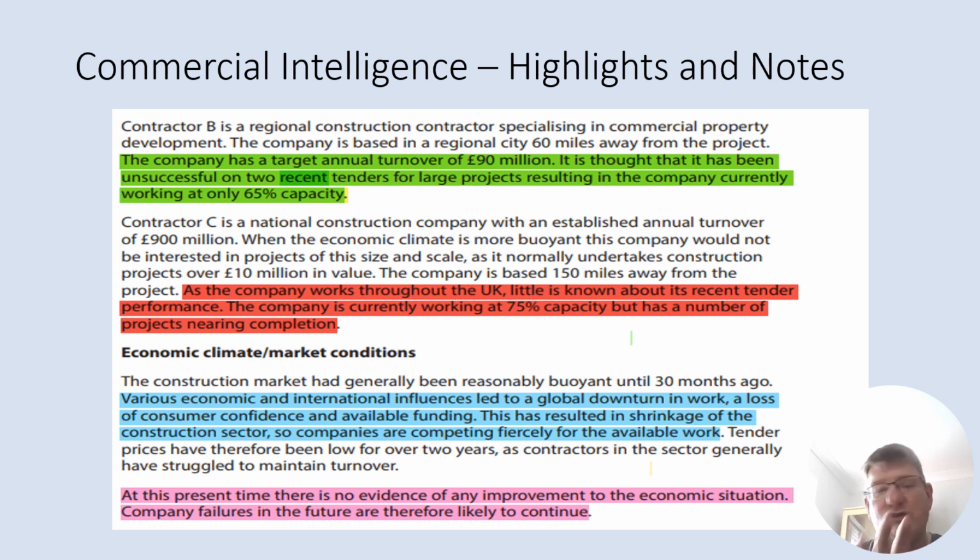The only trouble is they wouldn't know the local market as well as you guys, your companies. Some of the suppliers might not like working with them because they're big companies. They might not pay on time, so they might not pay in 28 days. They might pay in 60 days or even 120 days on some of the bigger contracts. So as a supplier and subcontractor at a local level, you might be waiting a long time for your money, and that's an issue with cash flow. But they are probably the ones that are going to go in the keenest for it.